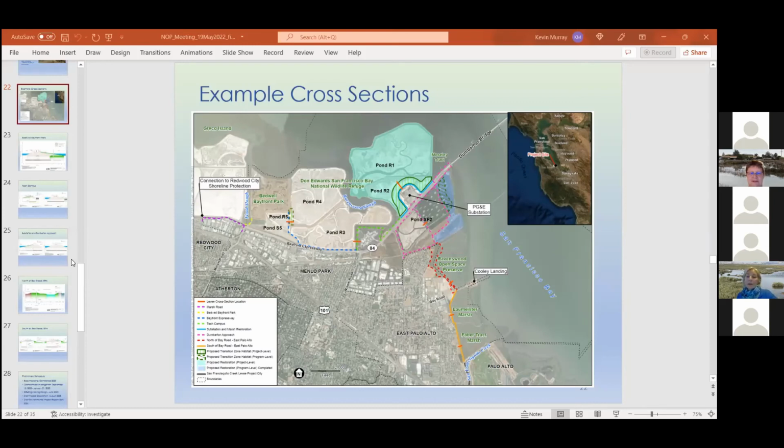So it is a restricted construction season, but it's a little bit different than the previous project, though it's similar for the Ridgeways rail. What we don't have, well, I'm not sure about this part of it, because the other part would be the fish restrictions, but we will have to adhere to our special status work windows with a very limited construction season inside the marsh and channel.